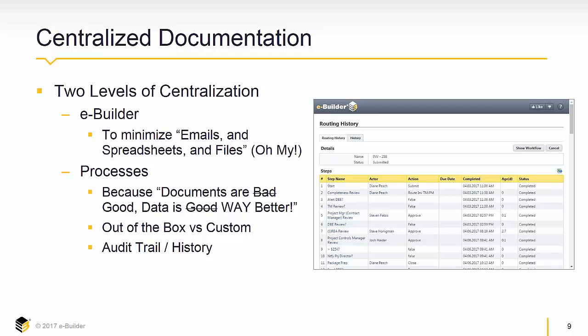It really is. It really facilitated us getting a much better handle on things, and it wasn't like we had to implement everything all at once. We grabbed the low-hanging fruit, like RFIs and maybe some nonconformance reports were put in first, and then we said, well, let's do some submittals and add change orders. Before you know it, we've got over 100 process types, and they're all facilitating the different phases of our projects as we move through design and on into construction.